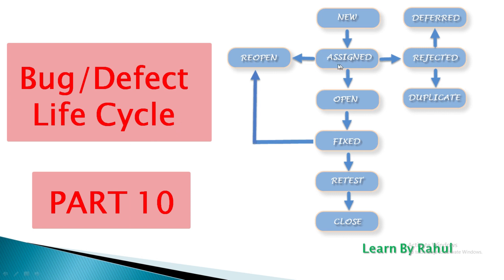Then the third status is OPEN. The developer starts analyzing and works on the defect fix. Next is FIXED. When a developer makes the necessary code changes and verifies the change, they can mark the bug status as FIXED.